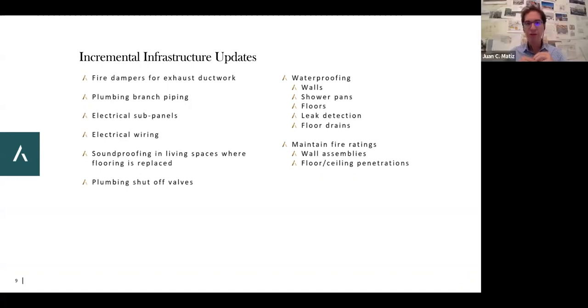And I think that's where we sometimes give advice to clients. Sometimes clients come to us, architects, and they have a vision of doing this gut renovation or doing a lot of work. But when you start talking about what it means, then you have to start putting back. And usually our advice can sometimes be to no longer do as much work as they were thinking. What do I mean by that? Clients sometimes are like, oh, I just wish I could put my sink in this corner instead of where it is. But moving that sink and the pipes, maybe just 6 inches, could wind up forcing them to rip open that entire wall to get the sink shaved over.